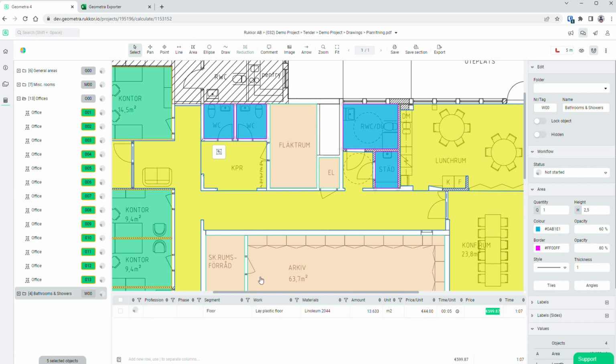And then we're going to look at this, and because these are a little bit more difficult, we might want to increase this to 10 minutes per square meter. And then we can actually go do the walls as well.